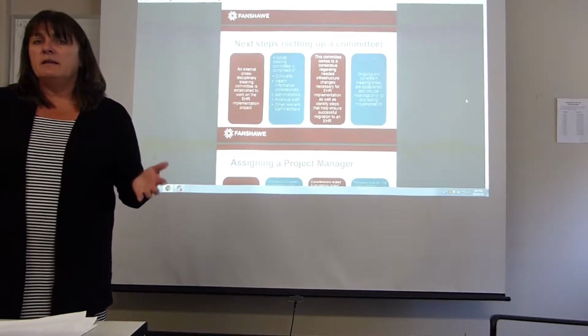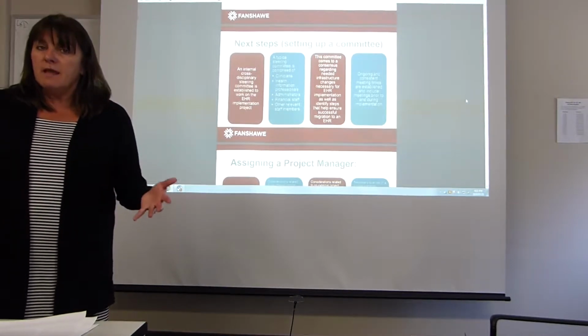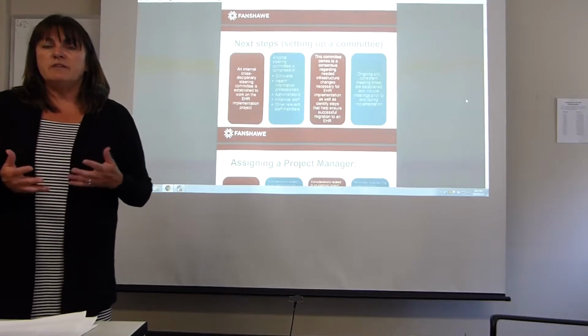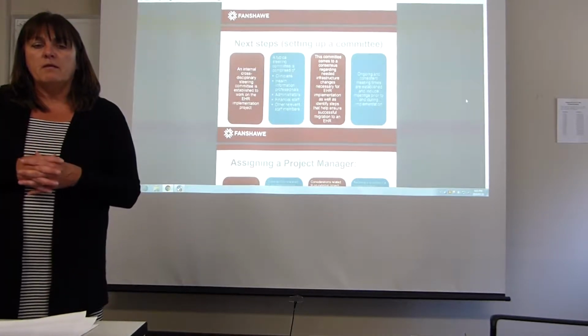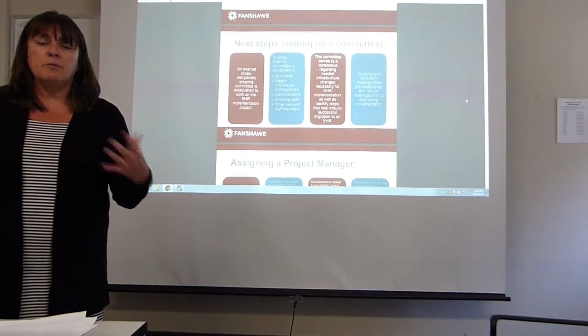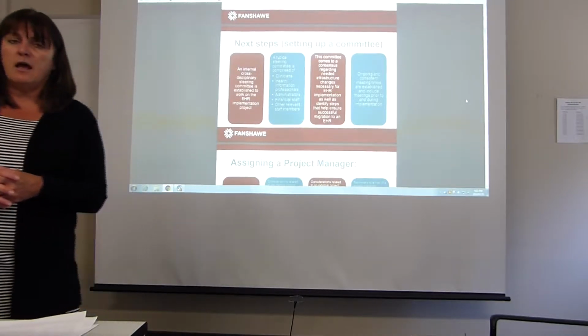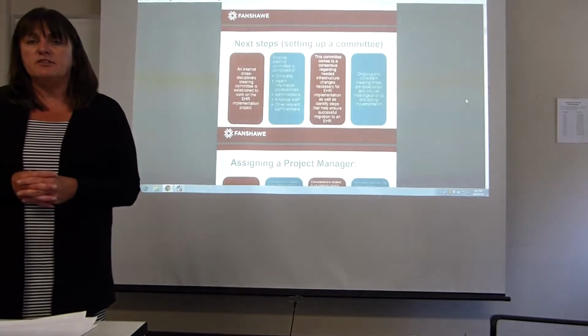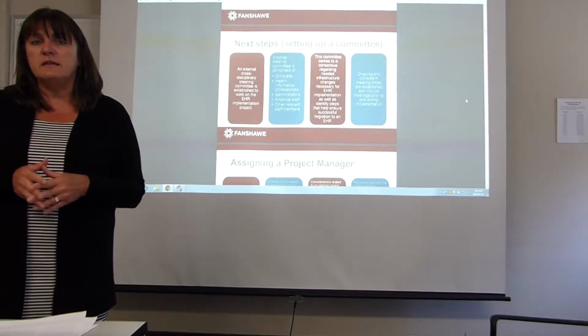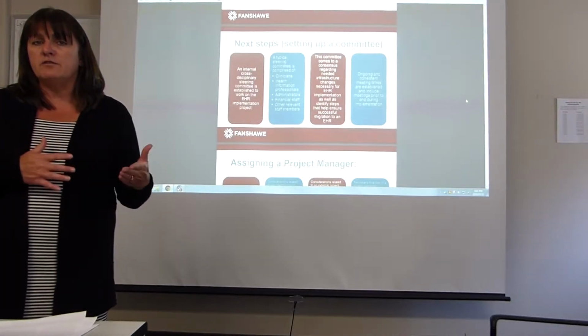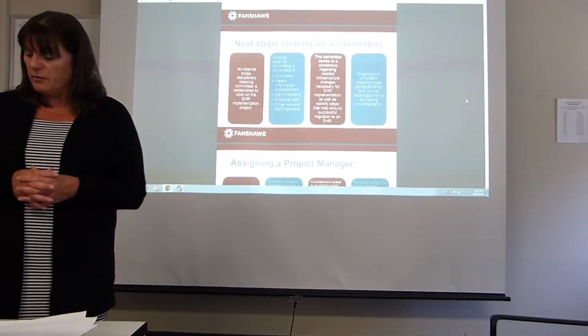Prior to that, a plan needs to be in place even to select a system. So to have a vendor come to the organization and perhaps do a presentation on what's possible. Or many vendors, particularly if it's a public organization, there may be a request for proposal that's needed. And even prior to that, a request for information for vendors to come forward.